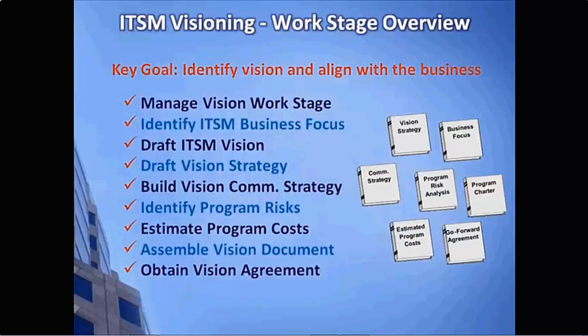But here, a peek at some of the efforts that are involved in this stage include, first of all, managing the work stage. That's just the simple project management piece of that. But then identifying what are the business problems we want to solve. What's that business focus? Drafting an IT service management vision. Drafting a strategy. Building a communication strategy. And the communication strategy will be the vehicle that we address the organizational change piece that is so important that we talked about earlier. We will identify program risks, costs, assemble our vision document, and then get agreement from all our stakeholders in terms of how we laid out the vision and how we intend to move forward and proceed.